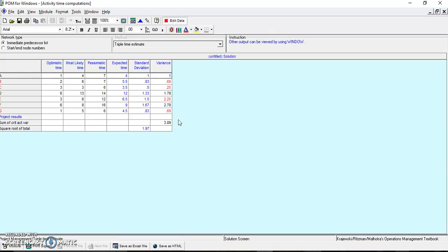Then I go to page 617, and on page 617, I go down the left-hand column, and I'm looking for 1.52. And I find the answer 0.9357. Okay, 0.9357. So that is the probability that I'll get this thing done in 23 days when my expected time is to be done in 20.